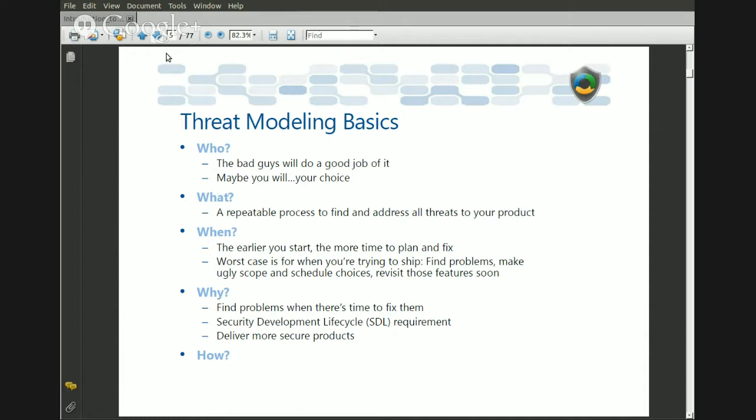Now, this is true not just for security, but also quality. The longer you wait to fix something, the further back you have to go into the design or development process to implement that correction. Imagine you're at day 1 out of day 400. On day 1, you know there's a risk, but you wait until day 40, and on day 40 you actually fix it.